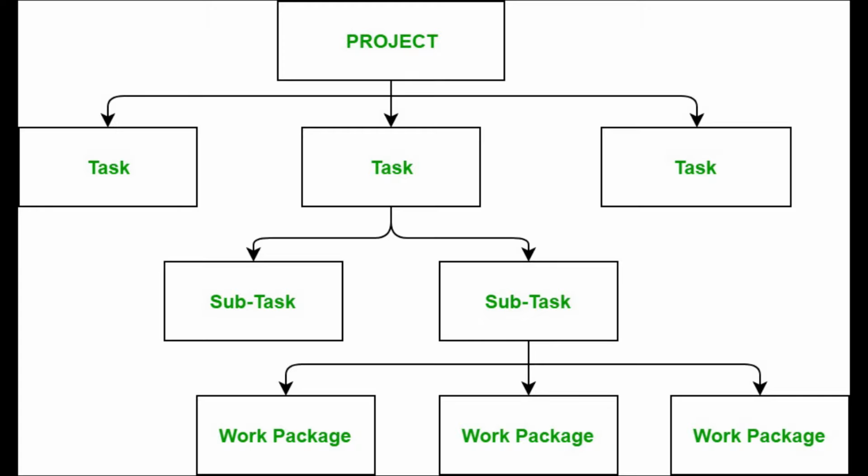A WBS is a hierarchical breakdown of work. Here you will subdivide the project into smaller pieces. Each descending level represents an increasingly detailed definition of the project work. Lowest level WBS components can be scheduled, cost estimated, monitored, and controlled.